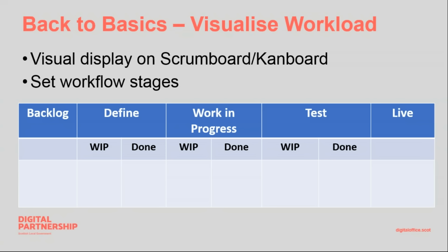Now here you can see the first column is the backlog, and in Agile that would be your sprint period where you would put up all your work for say a period of 2 to 3 weeks, could be a month, whatever you choose it to be, but it's usually quite a short period of time. However, we weren't really at that stage, so we used it for basically putting all new work coming into the team onto the backlog, and then we would discuss whether it was valid at our daily meetings.